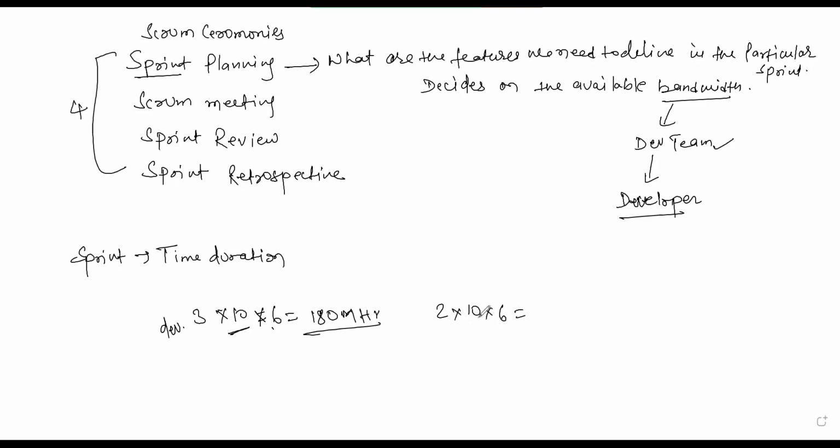So 20 into 6, 120 man hours are available for the testing. They will write the test cases, they will help the developer with their unit testing, and they will provide the test data to complete their unit testing, all the things.